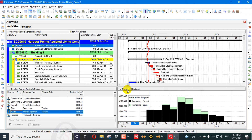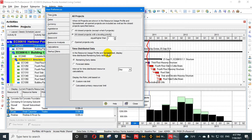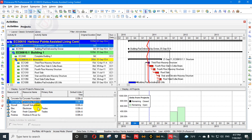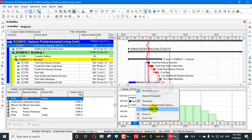In user preferences there is another option: resource analysis by project leveling priority. This is important because when your projects are assigned a leveling priority, you can see the priority levels — for example, one, two, three, four. If your company has many projects, like one hundred, you can set priority levels from one to one hundred or ten to one thousand. Projects not in the leveling priority range will not be shown here.